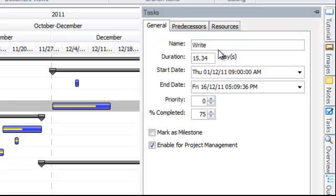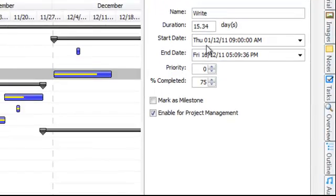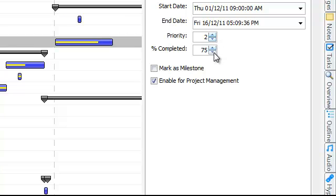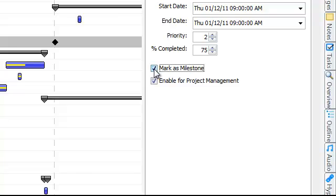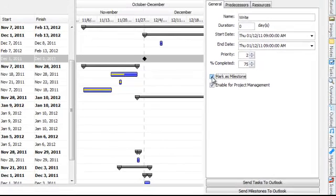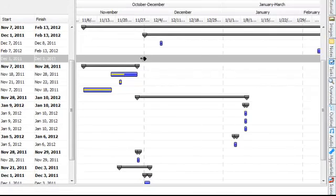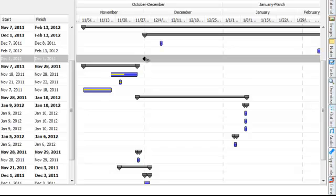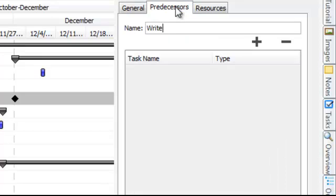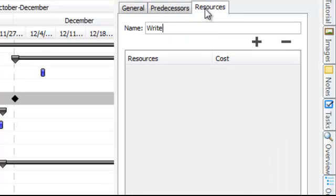Under general you've got the task name, the duration, the start and end times, the priority so you can set how important you think the task is and the percentage complete which we'll come onto in a minute. You can also mark a task as a milestone by using the check box and by doing this you will see the milestone icon placed in the Gantt chart. You've also got the option here to add predecessors and also resources to your project.